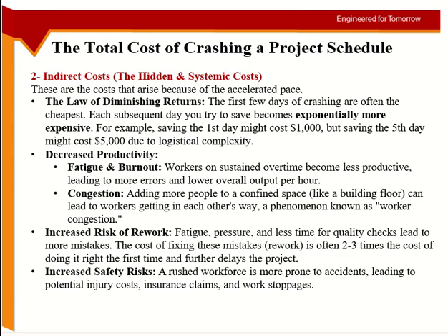No, on construction sites, if an accident happens, then the thing which that guy was doing will stop. If the accident involves an equipment, then the equipment has to be replaced. You have to report the case, and if the accident is major, it could be a police case as well. And there is compensation given to the person involved in the accident, if it was because of the work situation. So there are a lot of things. It's not like, just let this guy go to the health center and I will bring somebody else. It's not so simple. There are other costs involved as well, insurance claims and so on. And it appears on your company record.